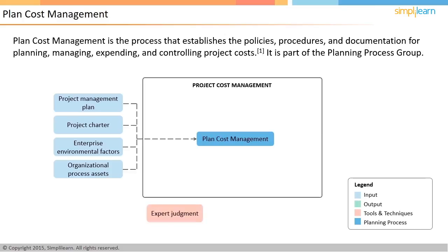Expert judgment refers to input received from knowledgeable and experienced resources. Experts can devise an approach to govern the costs on a project by using their previous experiences. Meetings may be organized to determine the cost management plan. Everyone responsible for the project schedule management, such as the project manager, representatives from the appropriate accounting or financial organization, sponsor, customer, and other stakeholders must attend these meetings.